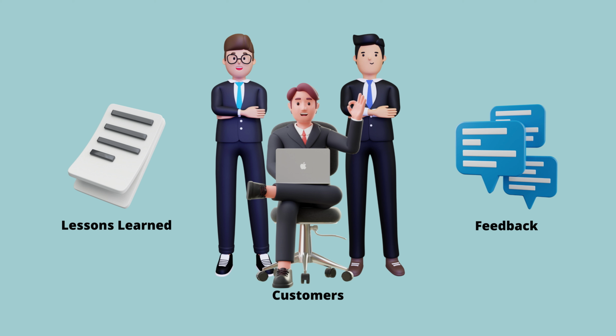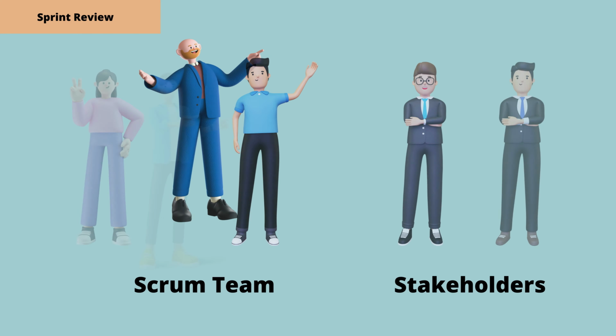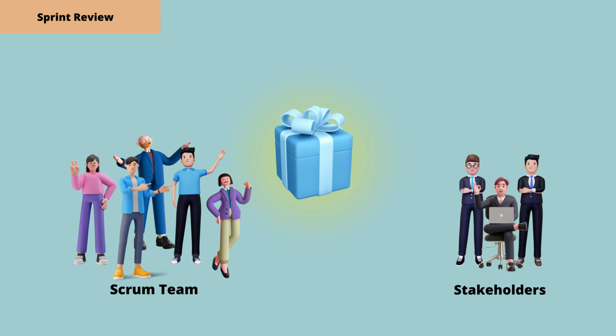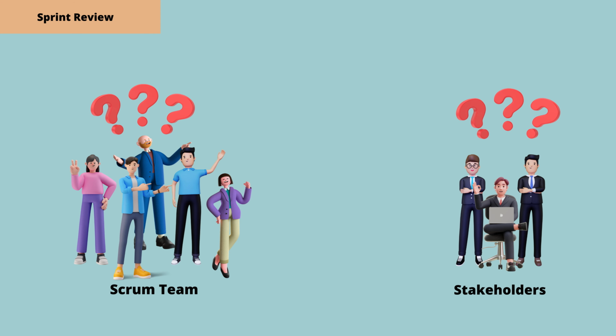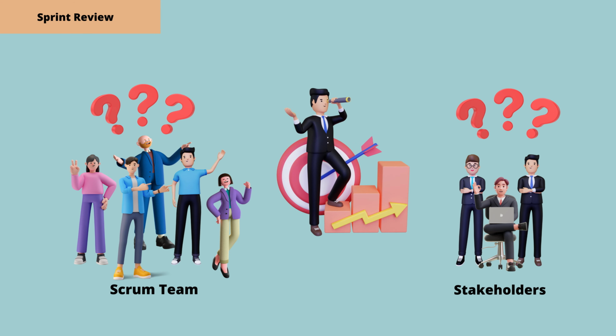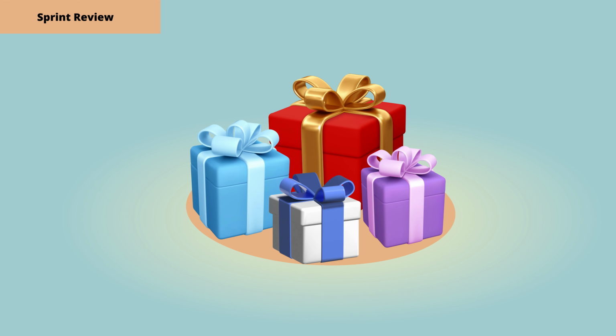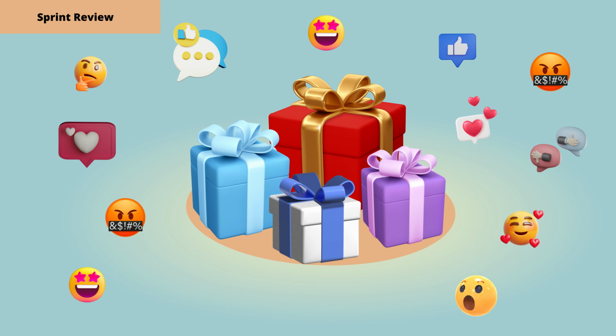At the end of every sprint, there will be a review, and this is a chance for all the stakeholders to have a look at the work that was done in the sprint, to take a look at the latest increment, review it, and think about what the next goals are going to be in the next sprint. After releasing an increment or multiple increments in the sprint, you get the opportunity to actually see what the customers and users think of it.